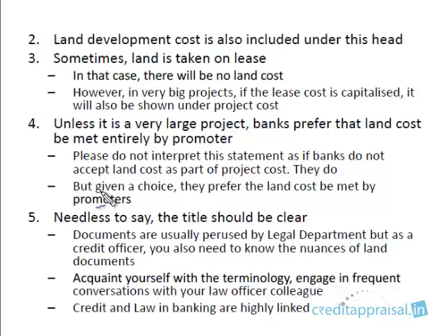Land development is also included in this head. Sometimes it's not just purchase of land. This land might be in very bad shape. Maybe there are a lot of bushes and various other impediments to using this land, so it has to be developed. It has to be brought to a certain minimum level. That cost is also included in the land cost.